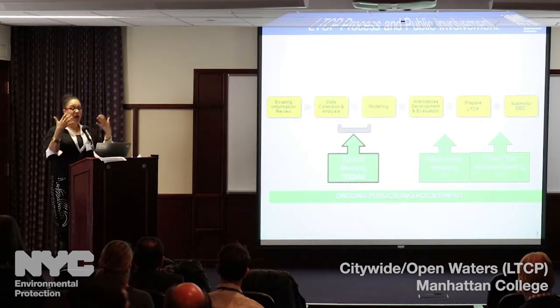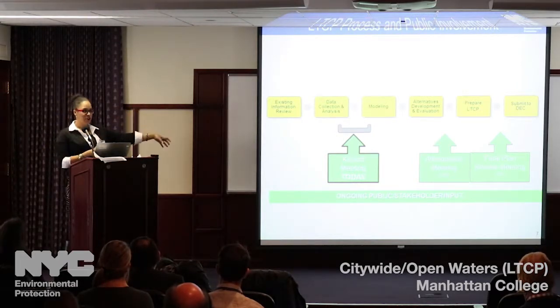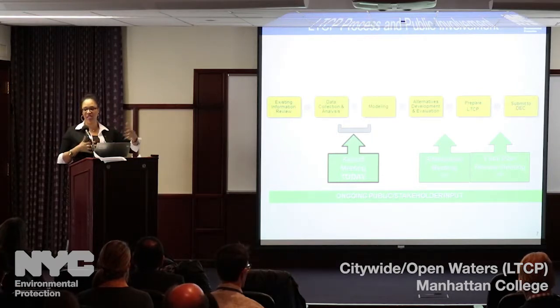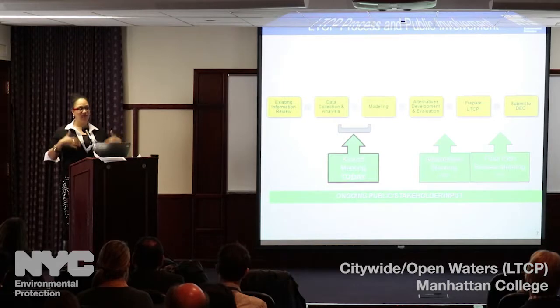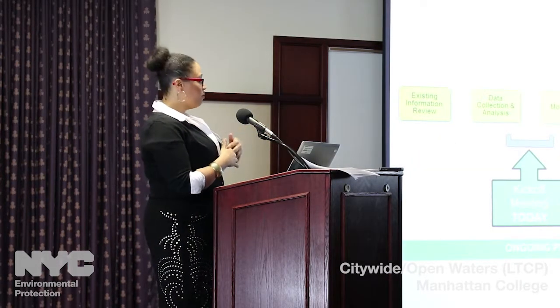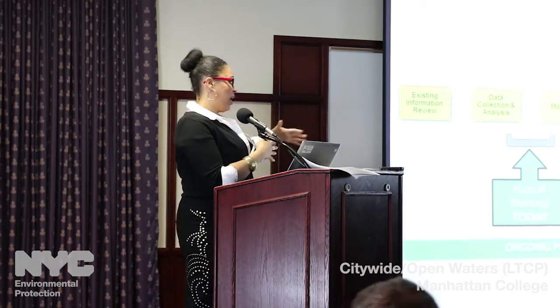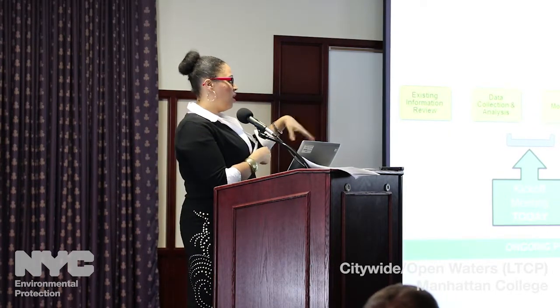And what we'll do is we'll come back to you at a later date for what we call our alternatives meeting, and we'll share with you all of the different types of CSO control projects that we've evaluated to get your opinion on them. Then we'll be developing this long-term control plan, and we'll be having what's called a final plan review meeting.